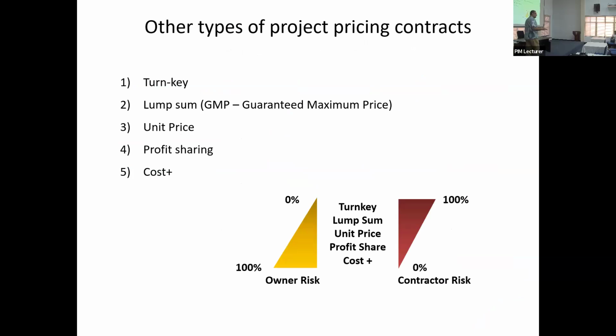Most of them, all 5 in fact, will have almost the same cost, plus or minus 5-10%. You can't have 100 million and another fellow giving 2 million. 100, maybe 102, 99, in that range, the costing part. But please remember, I'm talking about costing, not pricing. Cost will be the same.